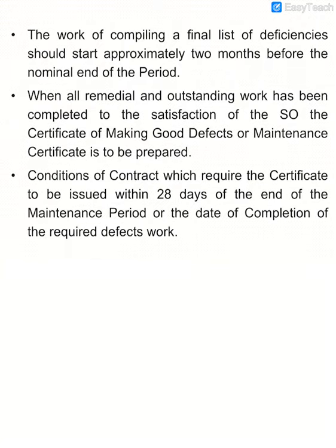The work of compiling a final list of deficiencies should start approximately 2 months before the nominal end of the period. So 2 months before the end of the DLP period, they have to compile the final list of deficiencies.